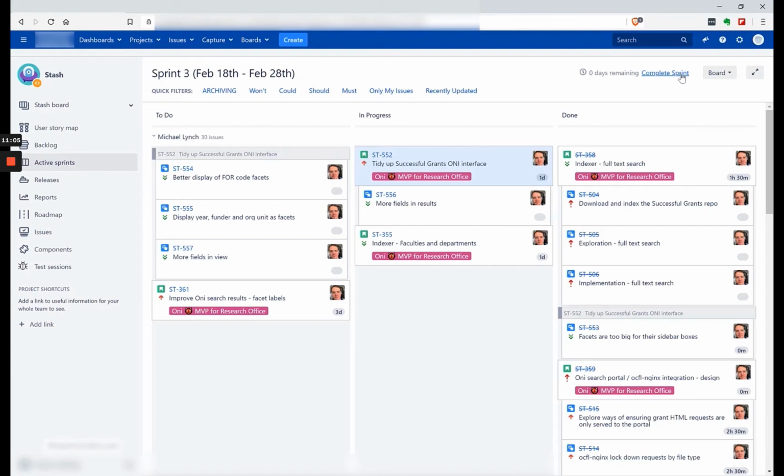Because remember that even though we might have a backlog, and we'll look at the backlog in another part of the course, even though we might have a backlog with an additional bunch of things that we're working on, in this scenario we're just going to show in the sprint the things that we're working on in this particular sprint, in this particular fortnight. It can become quite distracting when you have a big project with hundreds or over thousands of tasks that you need to complete to finish a project. Actually, this is one of the powerful things about Agile. It gives you the power to focus on a short time frame on the very specific things that you're going to be delivering in that sprint, which is what you're seeing here on screen.